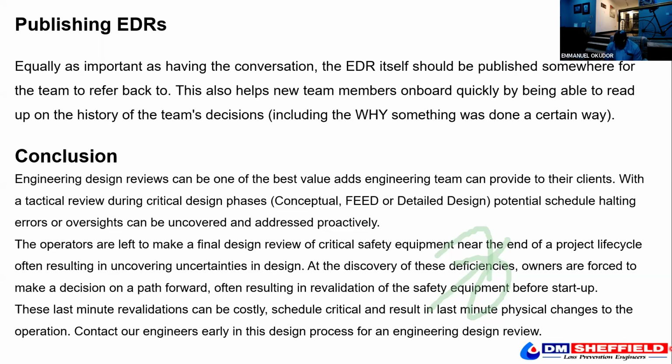We need to have this documented and signed off so that when we are here, everybody knows the next stage is engineering design review. You can also do a peer group review. You bring other people from other departments to review what you've done.